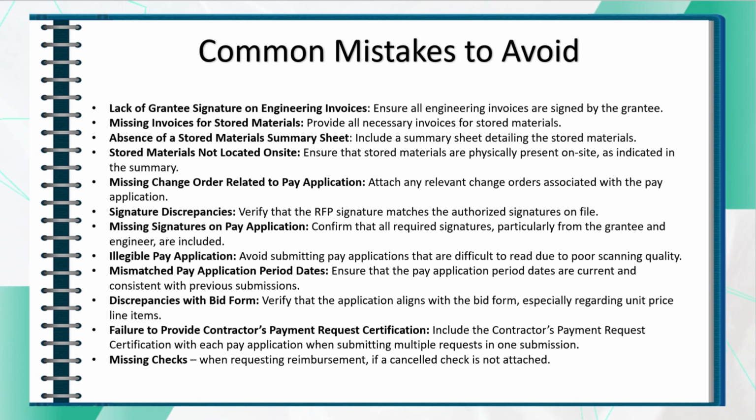Be cautious about missing change orders related to the pay application. Remember, substantial change orders must be approved in advance by RIA. Any minor change orders not yet approved by RIA must be attached to the RFP. These documents are essential for accurate processing.